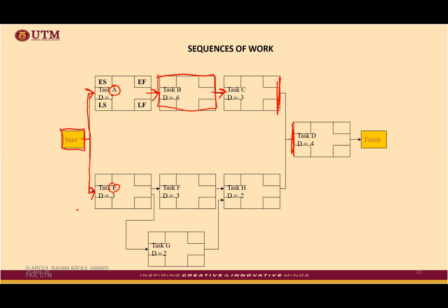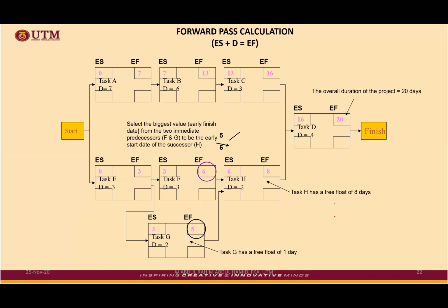Compartment meaning to say what to put inside your diagram. Inside the diagram, you need to basically draw a legend. I normally draw a legend like this because everything is there. Duration is here. This is early start, early finish, late start, late finish. I put total float here, and we can put free float here. FF is free float, not FS, which is finish to finish. Finish to finish is the relationship.